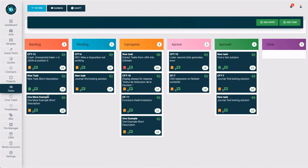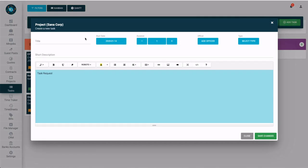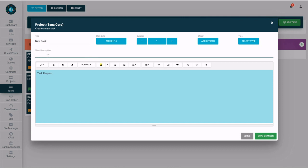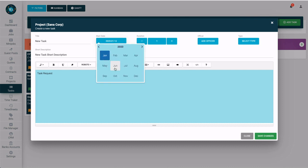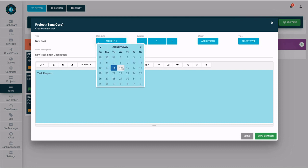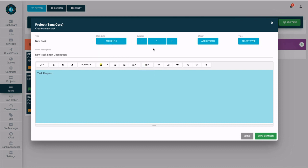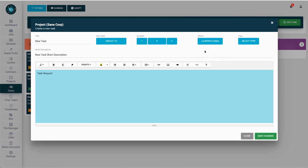Now is the moment to show you how to add a new task. Start by typing a title, fill in a short description of your task, select the date when you start to work on it, set the number of days needed to finish the task, assign the task to an employee, and select the type.